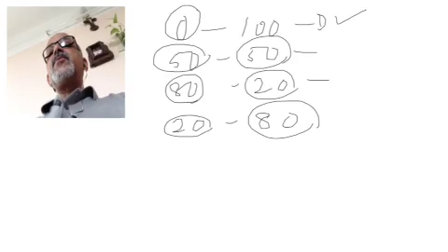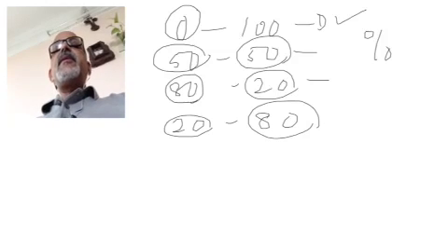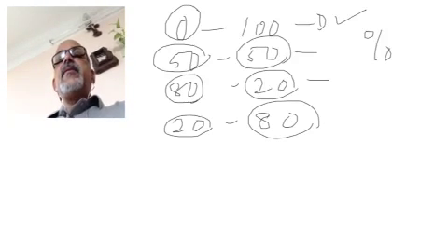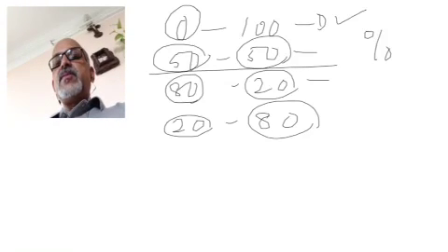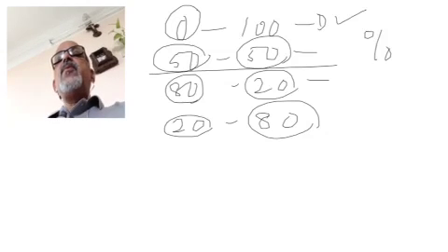If nothing is given, you go by the percentages. 20% means 20% of the plan value will become the earned value. But if some guidelines like this are given, then you should count the earned value based on these policies. So now let us take an example where the earned value is counted based on a 50-50 rule. That means the moment you start the work, you can consider it as 50% done, and the remaining 50% can be treated as done only when the work is 100% done.